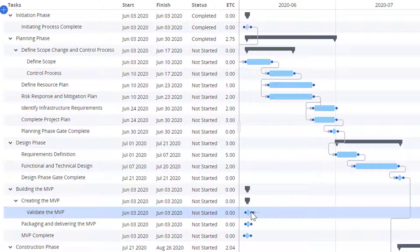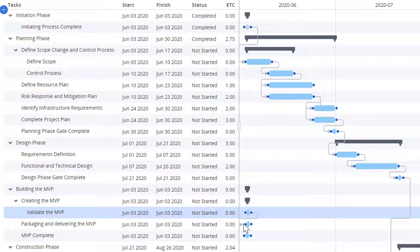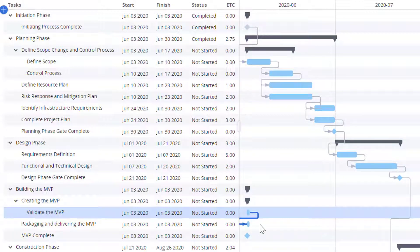We can now add dependencies between these tasks. Let's ensure that the users can only start packaging the MVP after the development is complete.